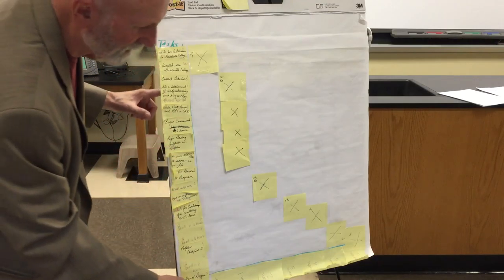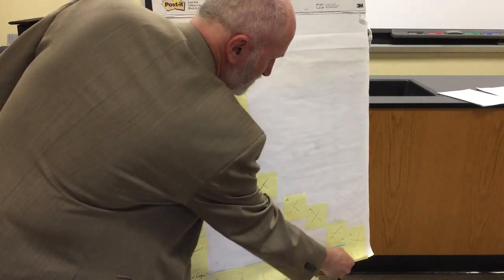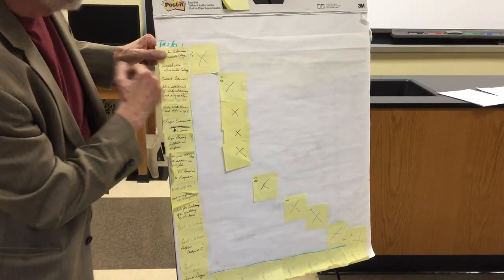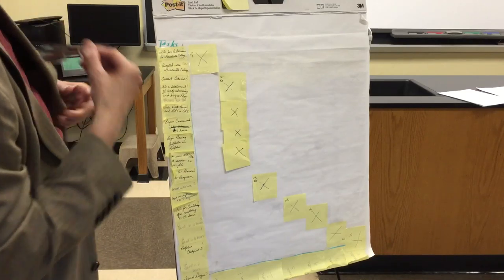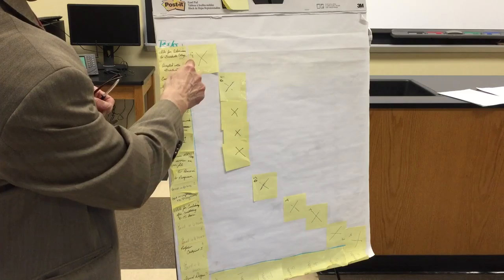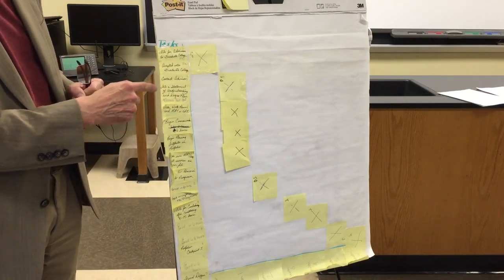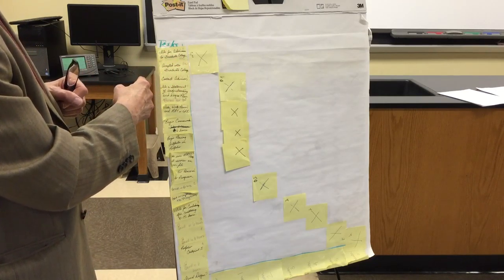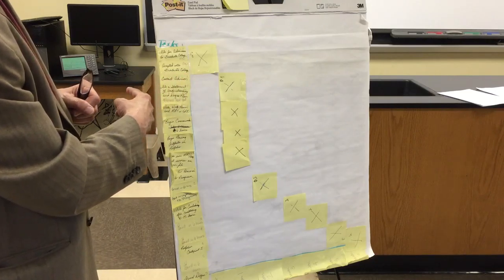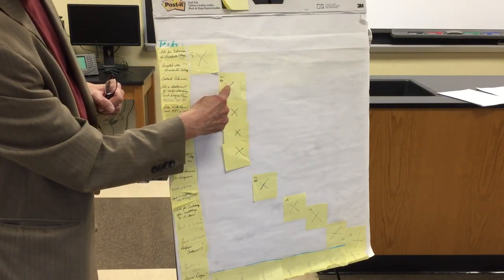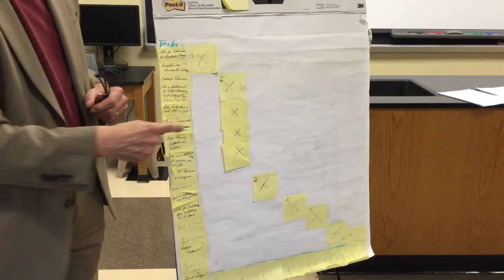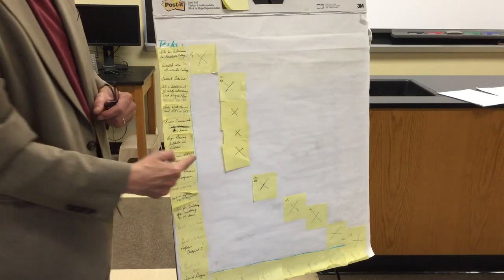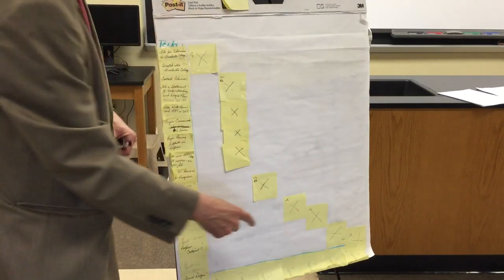This group was doing six hours a semester and six hours in the summer, so they did this two-year plan. Here's the time — each of these represents another semester. They had a zero semester for all the steps before classes started. They decided there were two or three steps before classes — they had to turn in their graduate admission, be accepted, and contact the advisor. Then during the first semester they took two courses, their placement test, and their MAT, putting X's beside each step semester by semester all the way to graduation.